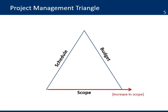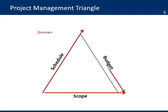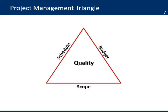Let's see an example. When your project has an increase in scope and you are asked to do more than planned, the triangle is not in balance. In order to do more work, you need to increase the schedule and increase the budget. By making those changes — increasing the budget and increasing the schedule — there is now a new triangle, and the project can meet the quality standards.